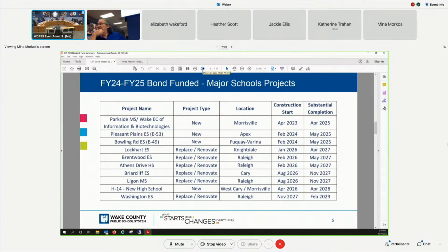And I think this goes back to what we've talked about with our rubrics and our scoring, right? I mean, I love Hunter Elementary School, but that doesn't mean that if PRIMP funding were to go to, just because Fuller had its renovation, that now that would suddenly put Hunter up at the top of the list when there's other schools that have been waiting for years for similar renovations. So while it's good to raise those concerns, I think we have to remember that we do have a lot of very objective criteria that we use to rate and rank these projects.